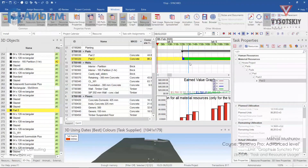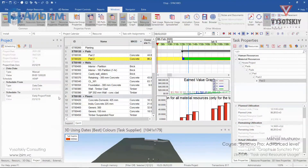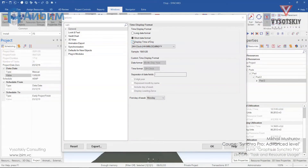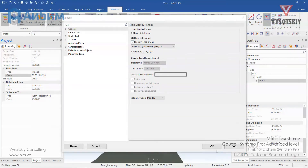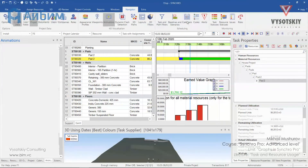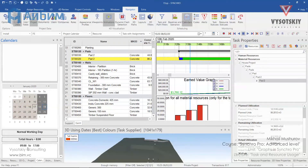background color overrides and so on. The blue line is our data date. You can change it from the project data date value. In case you don't see hours here, go to the options and tick 'Display time of the day'. According to our calendar we start our working day at 9 and finish it at 5.